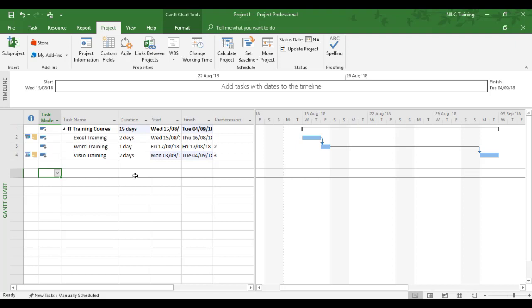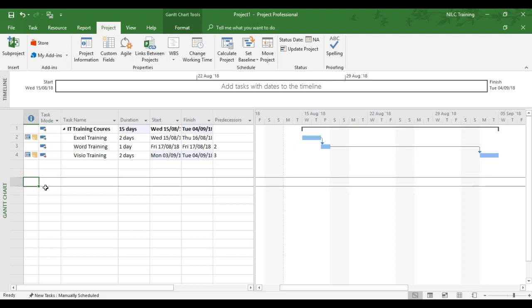This gives you an idea of the use of auto scheduling and the ability to add features like constraints to make a change for you, or using the project start or finish date to make changes. With auto-scheduled tasks, you wouldn't make any changes yourself—you just let Microsoft Project make the changes for you according to specific settings that you put in like constraints. This completes the example of auto-scheduled tasks.